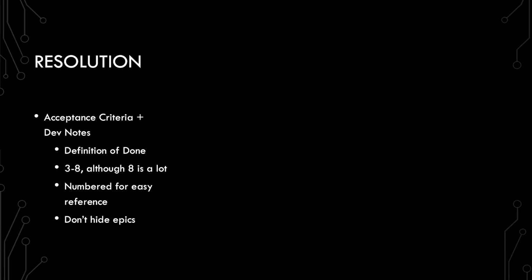And another little piece of advice is sometimes we as product managers like to sneak in epic sized functionality in the form of our acceptance criteria. So a few weeks ago, I was writing a story and I had an acceptance criteria list that was like 10 items long. And I looked at this and I was like, I know I need to break this out further, right? But I'm like, I'll just see if it slides through. I'll just bluff and see if the developers catch me on it. Well, we're in grooming, we're in estimating. They're looking at this story. We're using a Fibonacci sequence, and they're like, yeah, this is a 21. This is really huge. And I was like, yeah, okay, you called my bluff. I can't sneak anything past you. So I ended up taking that story and broke it down into different pieces that each had 3 to 5 acceptance criteria.